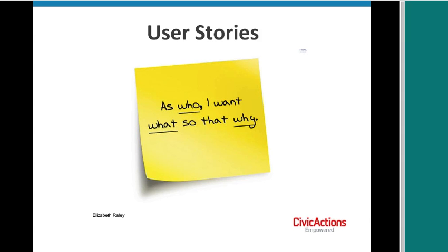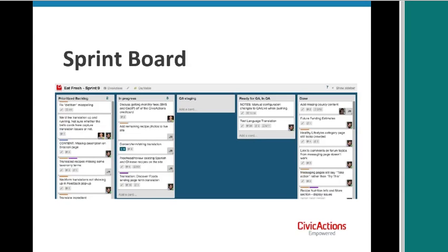The work is often visualized on what's called a sprint board. Here's an example of a sprint we did for the city of San Francisco. On the left, you've got all the work items that need to happen during the sprint. When somebody grabs something and starts working on it, it gets pulled into 'in progress.' As an Agile coach, I observe that the JR person has three things in progress — not a good job of limiting work in progress. Ideally each person has one item in progress. When it's done, it moves to QA staging, and once it passes QA, it moves to done.